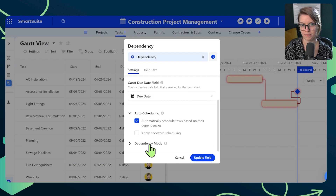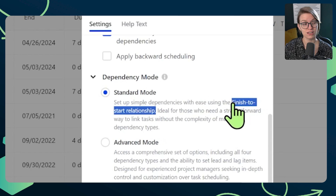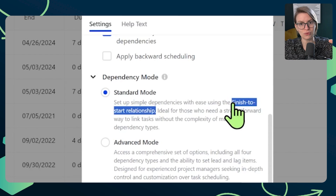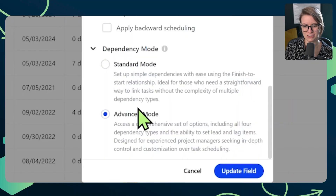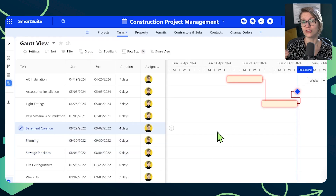The next suite of features tucked into the dependency field is the dependency mode — this is where we can define what a dependency means inside SmartSuite. By default, SmartSuite assumes we want things to be finished before the next thing starts: do one, then two, then three, no overlap. But most project management tools out there only allow you to have finish-to-start relationships. SmartSuite actually has an advanced mode we can turn our dependencies into that allows us to define with more detail what kind of dependency we are dealing with. If we update our field, you'll see four new types of dependencies pop up.